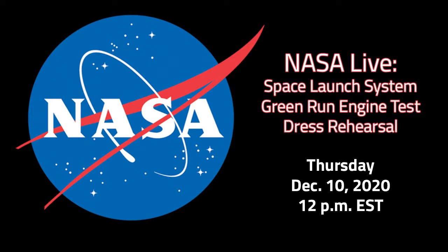Our team is still laser focused on delivering the core stage. We're not going to rush through any of this testing. Our end goal is mission success and astronaut safety. Right now, I would tell you that we're on a path to get back into the wet dress rehearsal and get to a hot fire test probably no earlier than the last week in December. That would be followed by a delivery to the Kennedy Space Center in the February timeframe. And we're still on track to support a November Artemis 1 launch date.